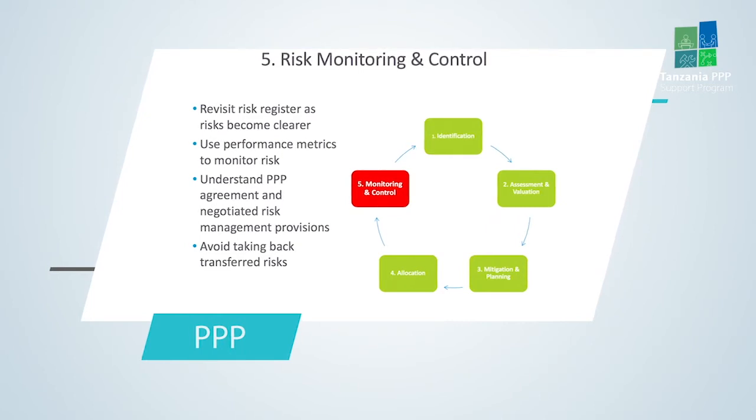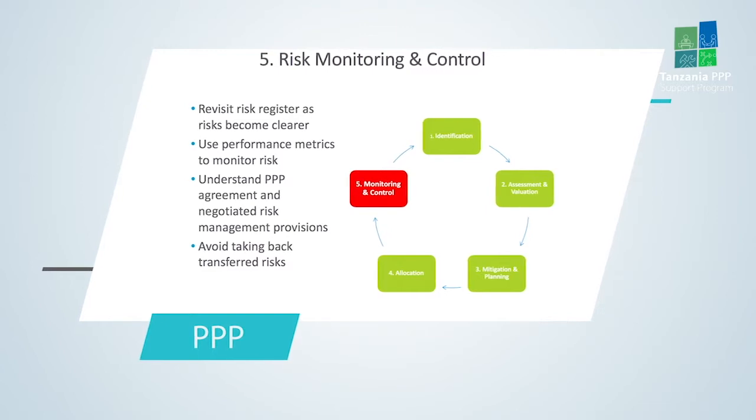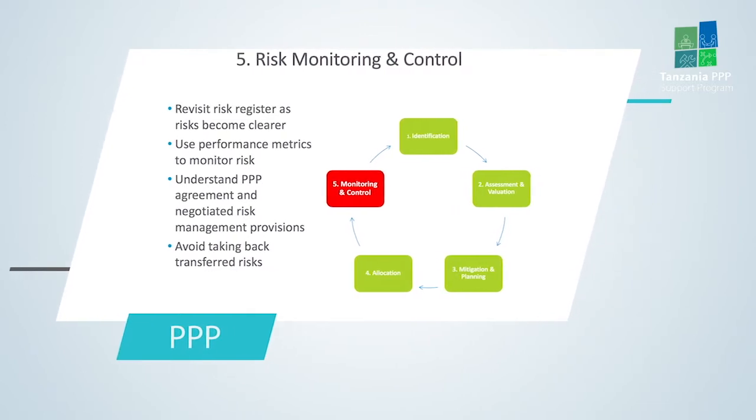Lastly, now that we've done all this work, all our risk strategies, our allocation of risk, what document are they embedded in? Where do you find risk allocation? What holds it together between the public and the private parties? What's that? He said the PPP agreement, the contract.